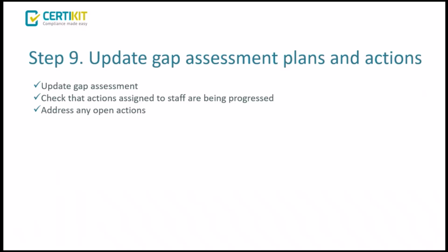Make sure when you get them started, it's documented and who is responsible, and it's time bound. Update your implementation plan. You should be doing this as you're going through your implementation anyway, but this is a good chance to sit back and have a look at it and say, right, oh, we've done that, haven't we? Have a quick check, tick it off. Don't forget your implementation plan is going to be a lot more granular than your gap assessment. So it's going to be a bit more requirement specific, and it'll help you making sure.